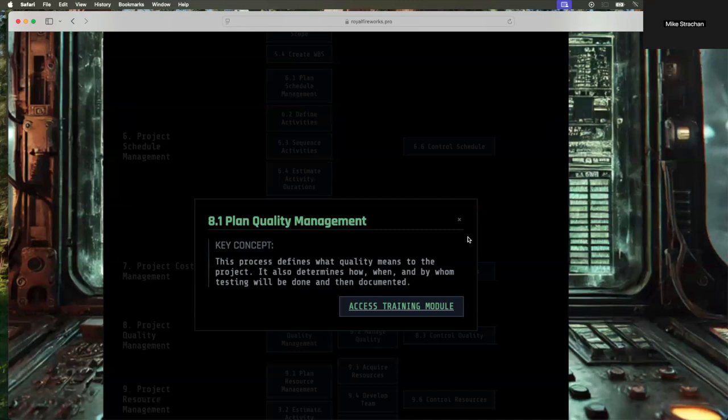But we design the actual testing in this process. We design how it's supposed to work. We design the grading scale to say pass or fail. We also say who's going to do the testing, when the testing takes place, and how they fill out the quality control measurement, the form proving the test actually happened, and they can save it. It's the receipt. All right, so you're showing the testing did take place for this widget, and it was saved.